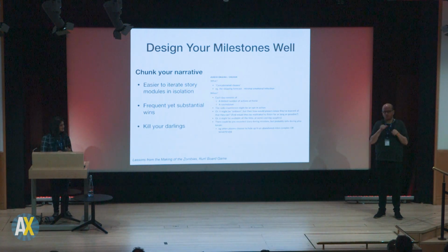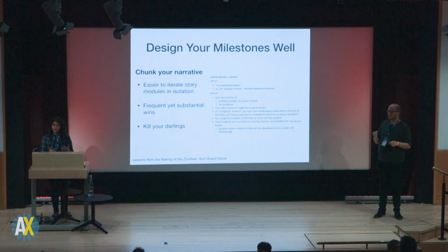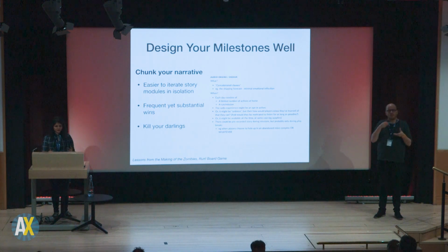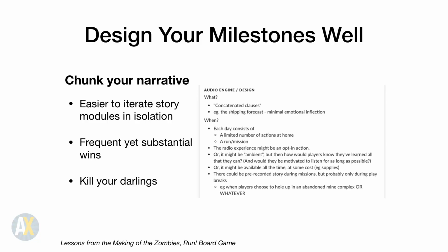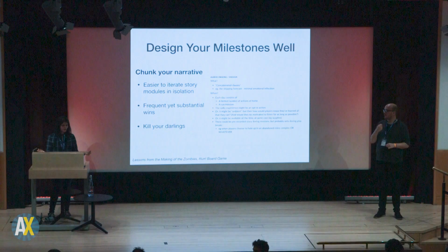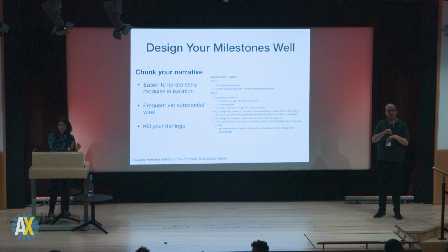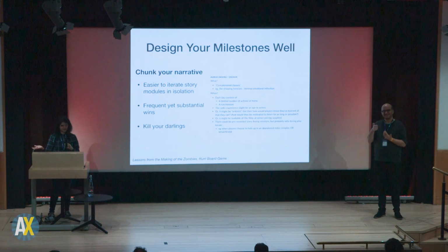And finally, this is the biggest lesson that we learned during the entire planning process. It's a story-based game. It doesn't mean you need to write the entire story and then play it. Like Chris said, games and story systems have to interact well together. So chunk your narrative the way that you are chunking your project management. In our case, for example, we had an 8-hour game. We divided this into 6 main scripts and 6 side quests and, you know, environmental events and things like that.